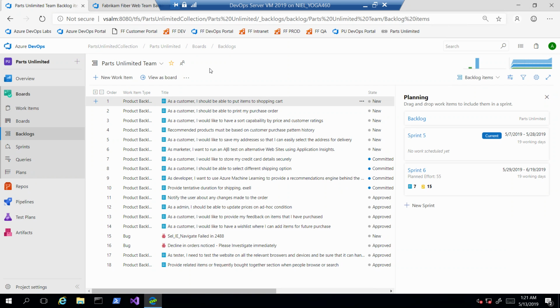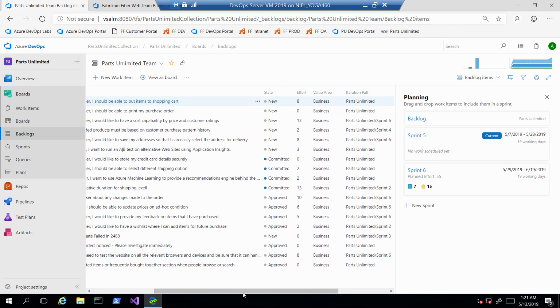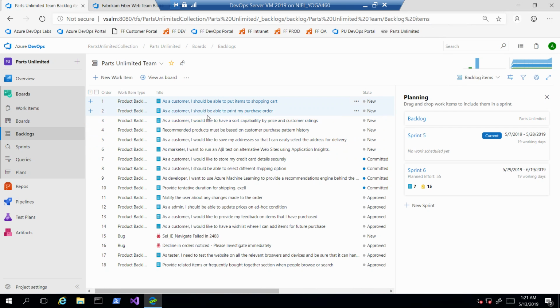The top priority items are sitting on the top of the backlog, so we, as a team, will be able to evaluate what we are wanting to do. And these are the important ones. We'll have a look at them and say, okay, there's enough information for us to actually deliver something. So then we can simply take them and schedule them for our next sprint or iteration.